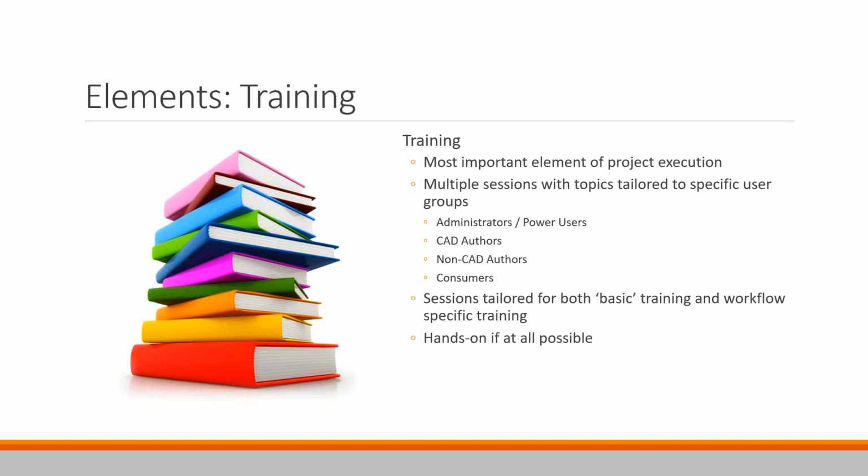In addition, what we're finding is it's good, if possible, to have a more general training session. So here's the basic how-to, ideally maybe with some courseware and hands-on training. And then a follow-up session that discusses both the specific workflows that were developed in the configuration phase, but also a refresher.